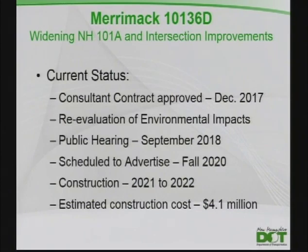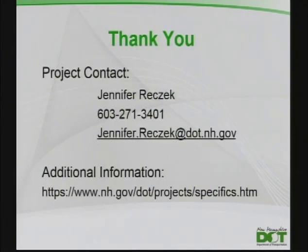Right now, we're scheduled to advertise in the fall of 2020, and that would start actual construction in the ground in 21 and 22. Right now, the construction cost is estimated at $4.1 million, and that's about all I have for you. If you've got any questions, this is my contact information. We do have a project website that we'll be posting information on periodically, including the plans and the presentation from this evening. So with that, I'll open it up.